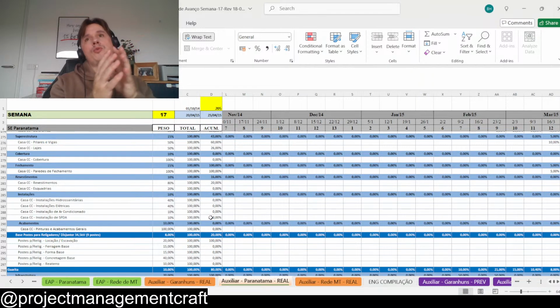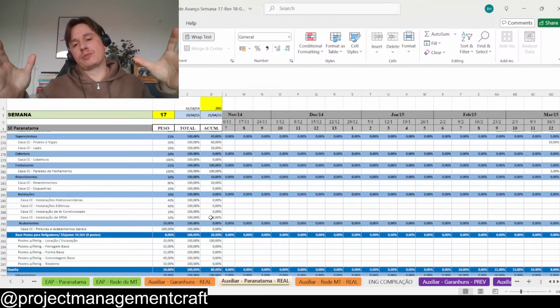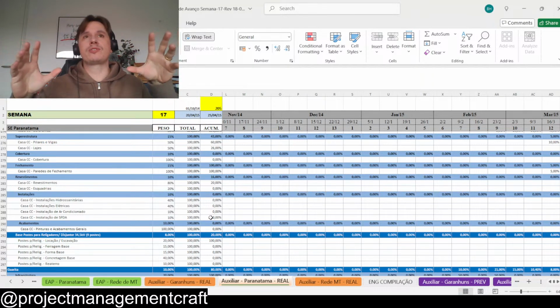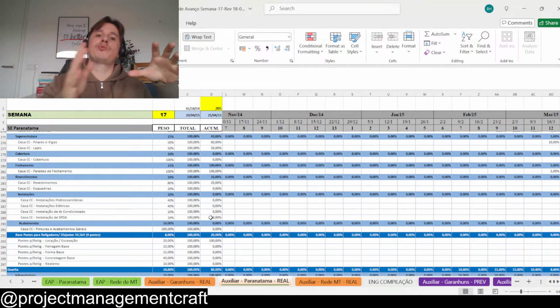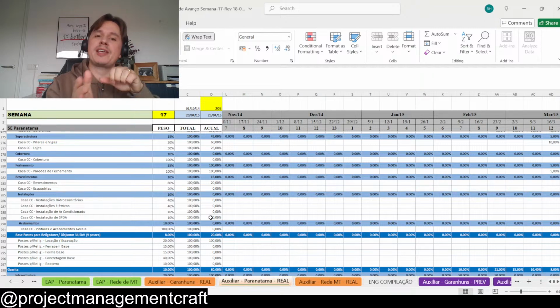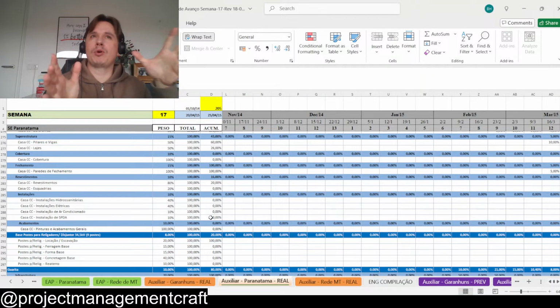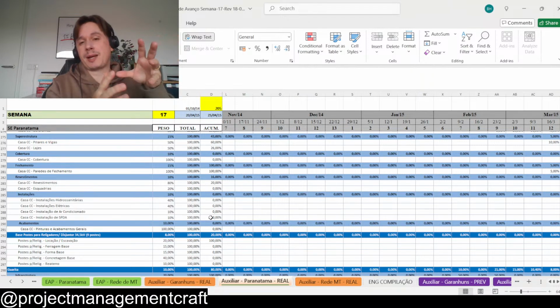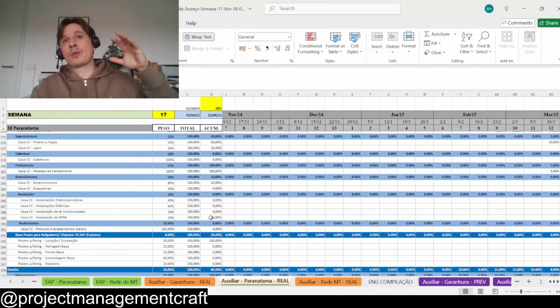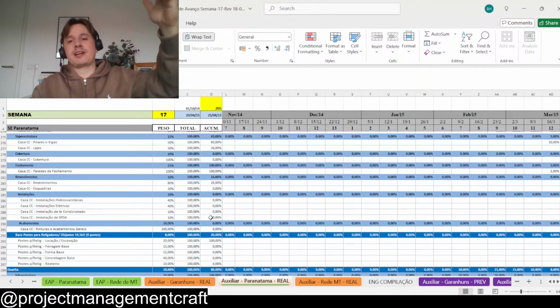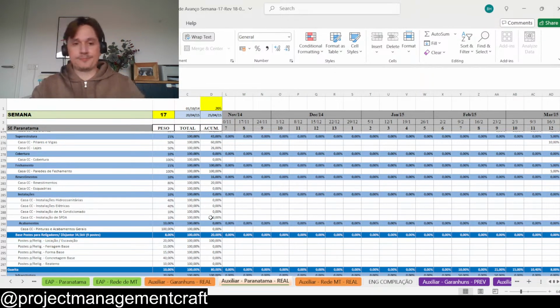For example, if you have long design cycles, you need to break down these design cycles, but tracking progress, if you have a block of, for example, 5 weeks, might be more challenging for some types of design. In the case I mentioned to you, for electrical design, I knew exactly, I had a list of all the designs that had to be created, issued, reviewed, and approved for release.